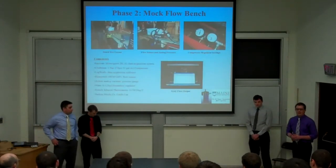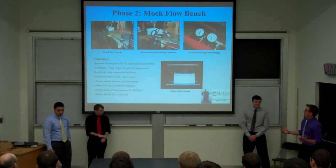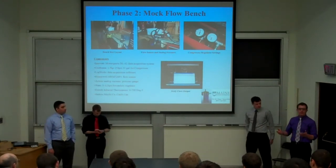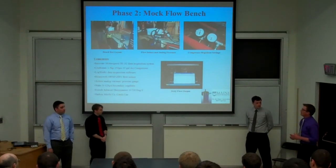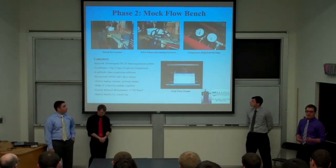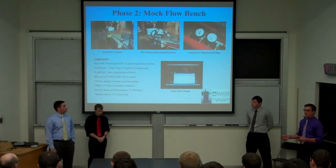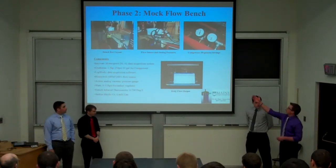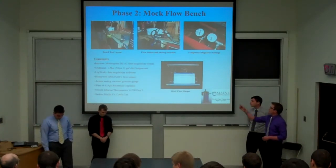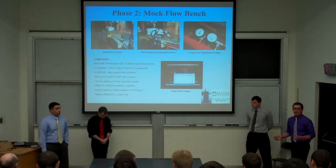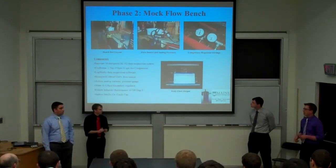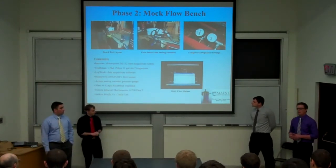Mock flow bench — fail fast, fail cheap. Once we had our data acquisition system and all the key components, we decided to use a compressed air source powered bench. Before spending all the time and money building the bench, we needed to prove the concept. As you can see in these pictures, we have our compressed air source, all the components from the data acquisition system, and our laptop. We were able to prove that we could achieve the desired zero to seven CFM, and once we had proof of concept we moved on to designing our flow bench.